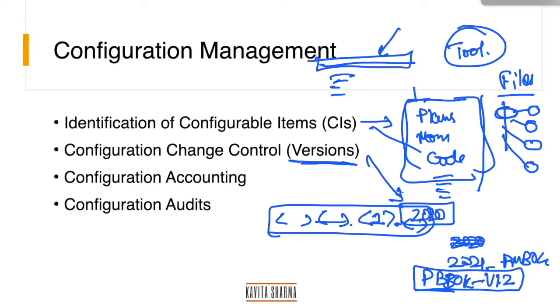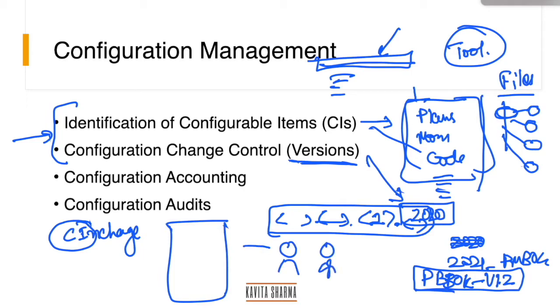So this is at the time of planning. Now after we plan, I'm gonna ensure that there is somebody called configuration in charge. This in charge would ensure that in the tool, right people have write access.